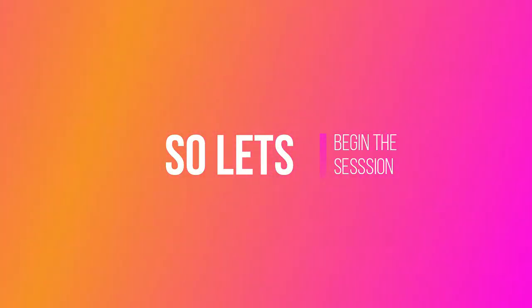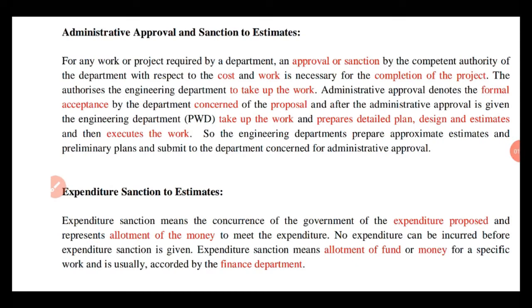First, administrative approval or sanction. For any work or project required by a department, an approval or sanction by a competent authority of the department with respect to cost and work is necessary for the completion of work. This authorizes the engineering department to take up the work.